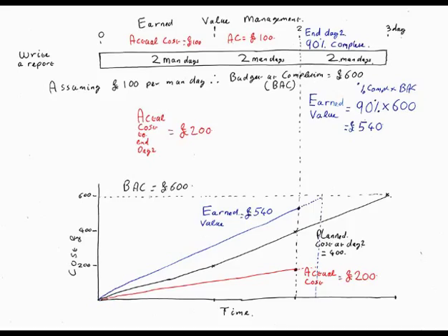Yes, about that. But is that accurate then? Big assumption, John. What's the big assumption? That the percent complete is right. Correct. And that the future performance is the same as the past performance. Predicated, yes, that's right. And the same for cost.